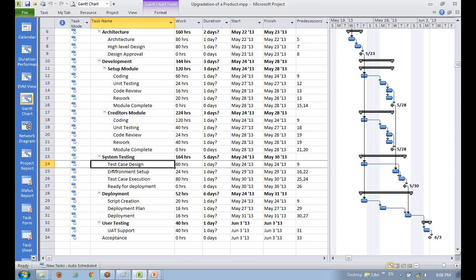So right now we are only going on the possibility that these successors can start after these predecessors. No, that's what we have done by default, because we have just defined the dependencies. Now the thing is that that's not sufficient. We need to tell resources when they have to do this. If you think the test design cannot happen at this point of time, then schedule it at a time when it can happen.